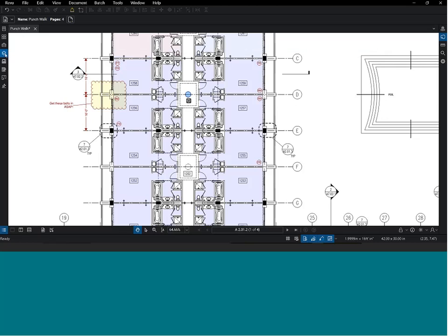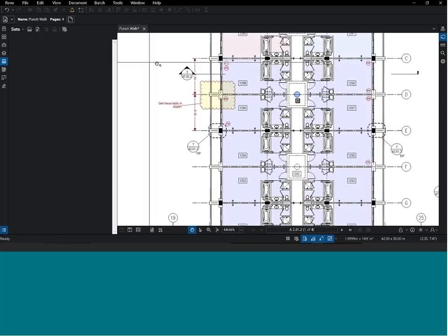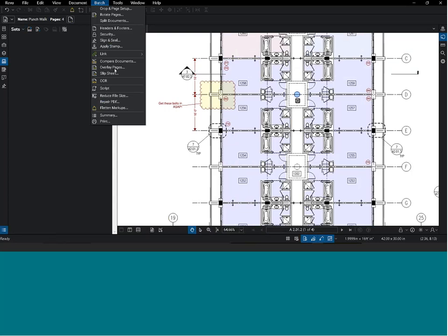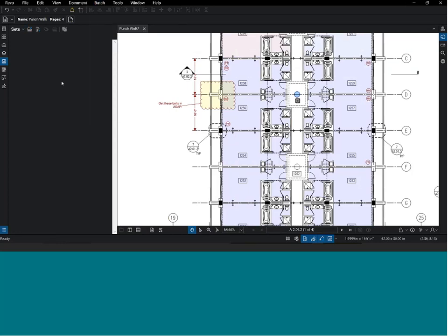With the RFIs in particular, there's a functionality called sets, and I can have as many sheets as I need in my project, all individual documents, but I can pull them into a set, and then I can access each individual sheet, so I don't have ownership of the whole thing. If it was a combined set, I would own the whole thing, but I can build a set, and then there's a batch slip sheet where I can slip in those revisions and it'll stamp the old one superseded, carry all the markups forward, and really do a good job of tracking those revisions. Okay. That's pretty good.